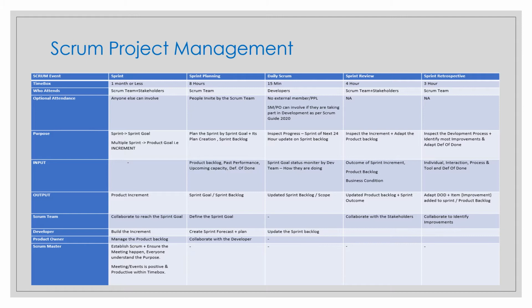When your project starts, there is usually no sprint zero in your Scrum guide. While setting up the project, we do this refinement activity. In normal practice, a few organizations keep a sprint zero, and when we start up with the refinement activity, we call it refinement zero, clarifying the details, adding descriptions to the priority one items, and answering questions.